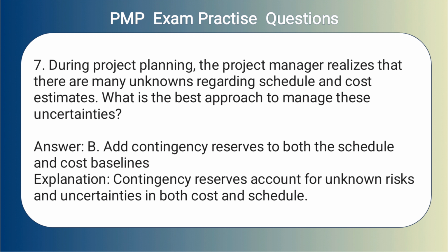Answer. B. Add contingency reserves to both the schedule and cost baselines. Explanation. Contingency reserves account for unknown risks and uncertainties in both cost and schedule.